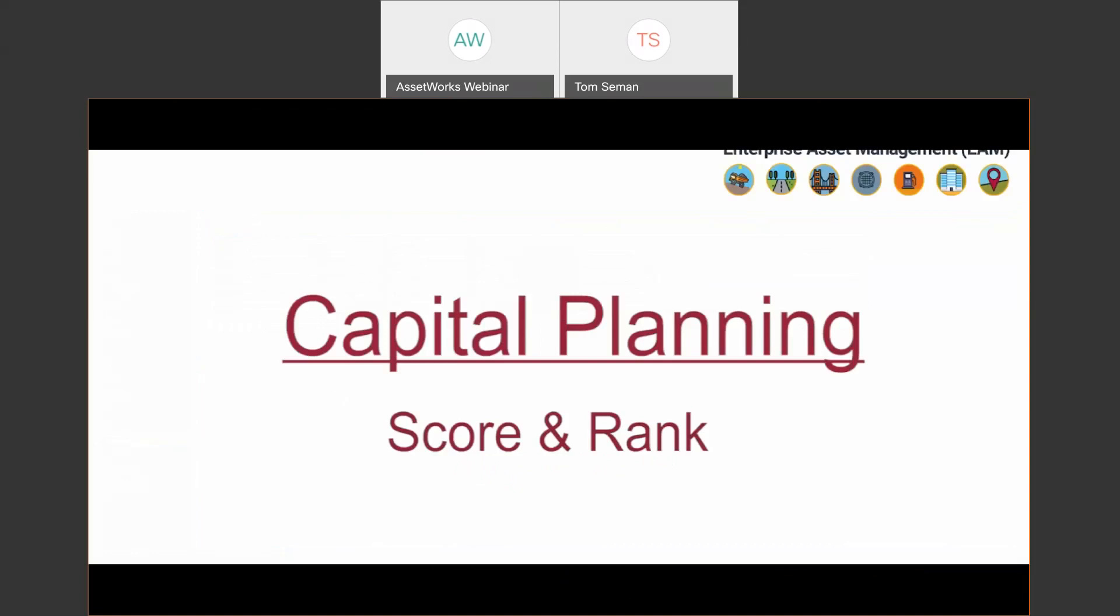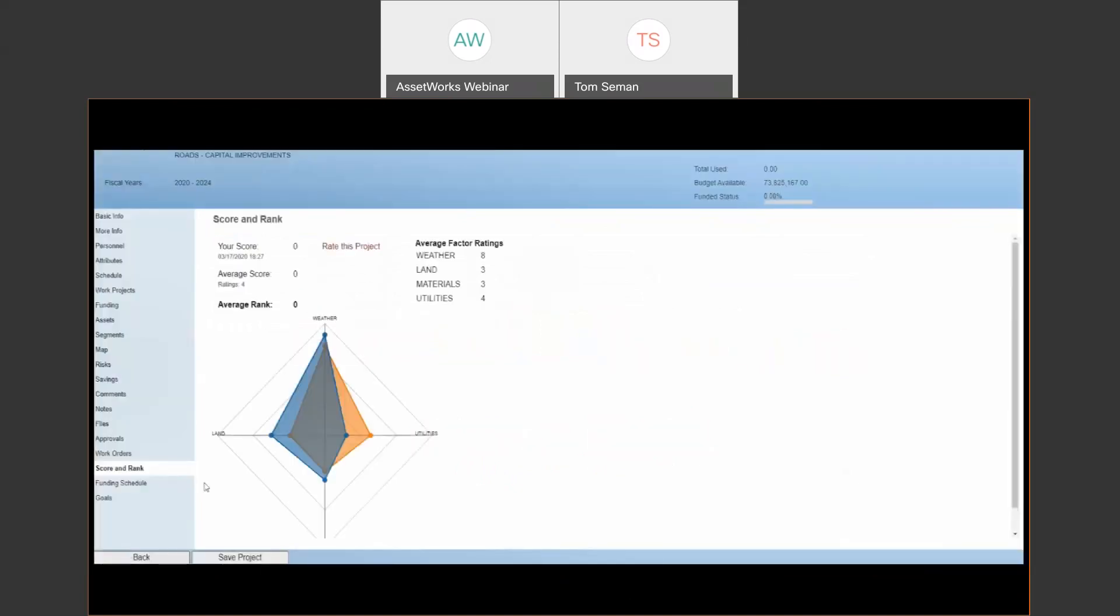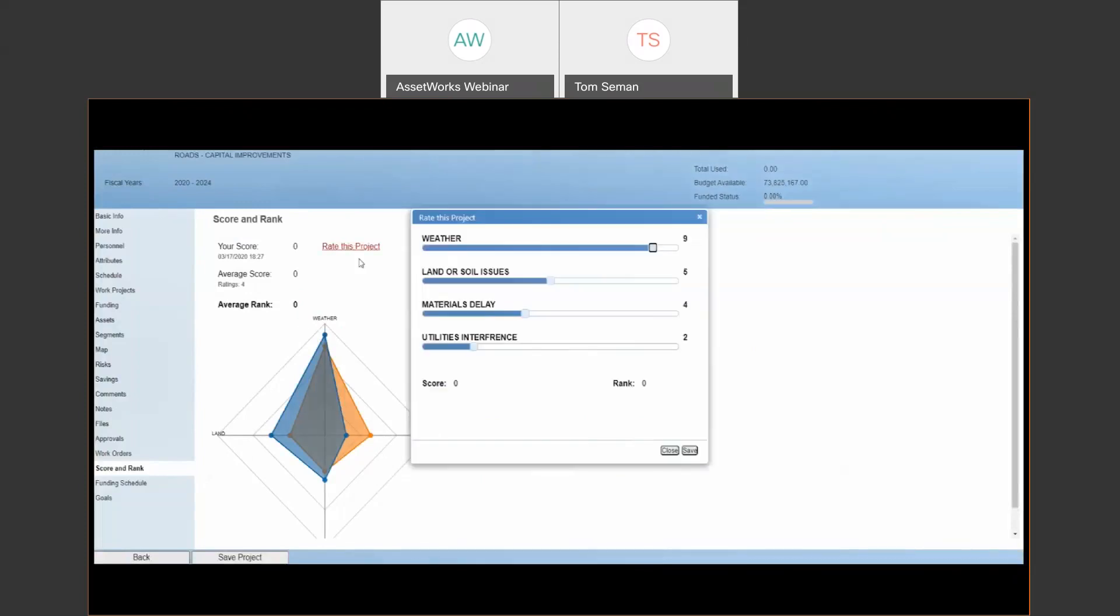And then our last section that I wanted to discuss is score and rank. So again, authorized users can rate projects through this score and rank section and project factors can be assigned along with a rating scale like you see here. So as users rate the project, the radar chart displays what factors are most important to you versus the average score of all user ratings.